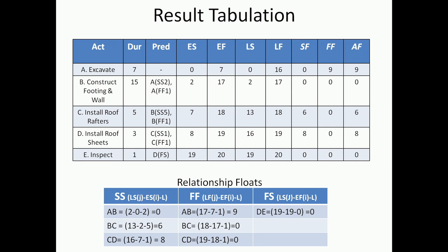One way of expressing all of these results is shown in a tabulation. We have activity, duration, predecessors, early start, early finish, late start, late finish, start float, finish float, and what we are calling total float or activity float. All of these values are listed and we have taken the relevant values from the network for early start, early finish, late start, late finish, and based on these we have calculated start float, finish float, and activity or total float. You should be able to check your calculations against this tabulation.